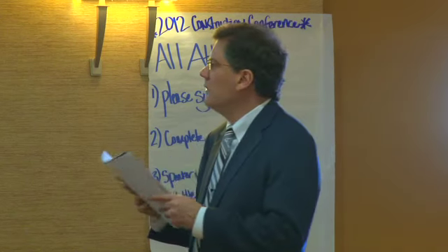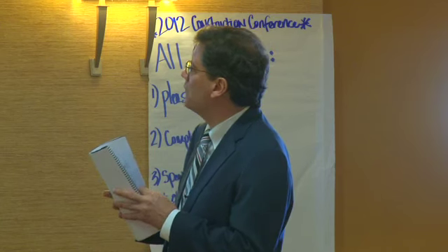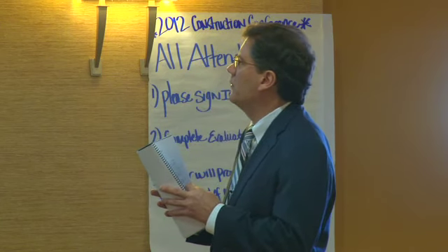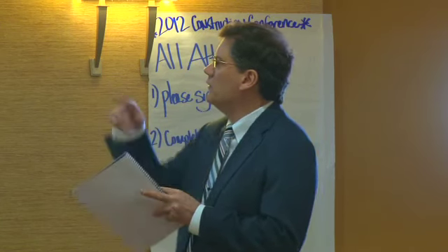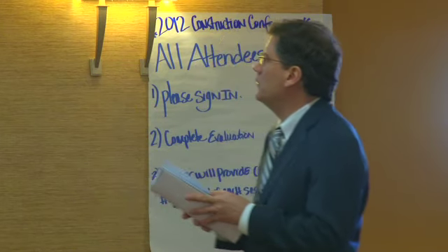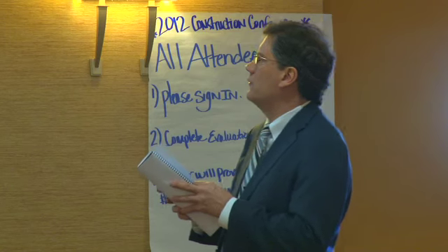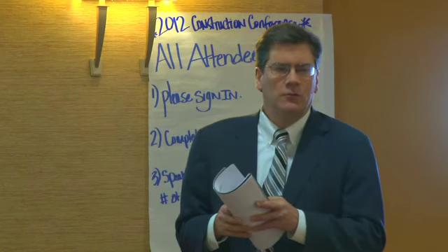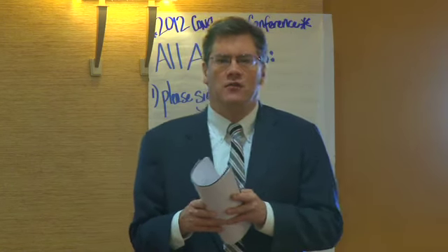Okay? Here's the money language. The release covers a progress payment for all labor, services, equipment, or materials furnished to the job site or to your customer through blank date only, and does not cover any retention, pending modifications, or changes or items furnished after that date. You supplied $50,000 worth of paint in January.